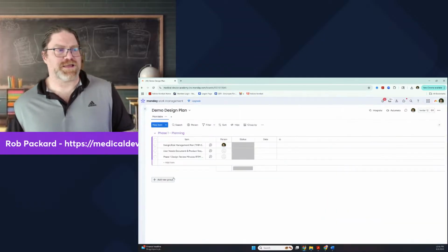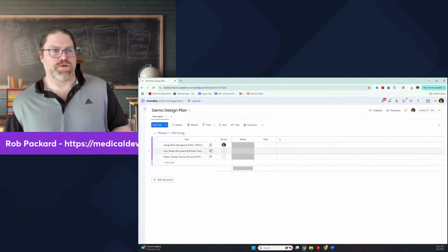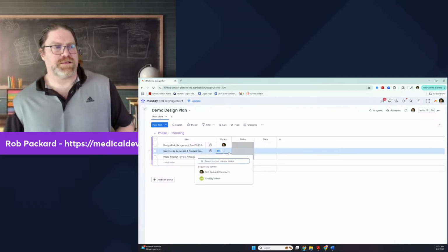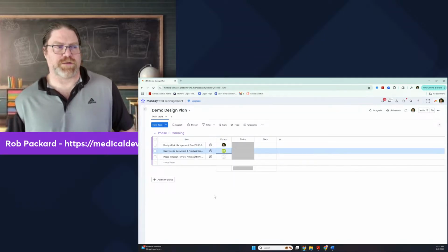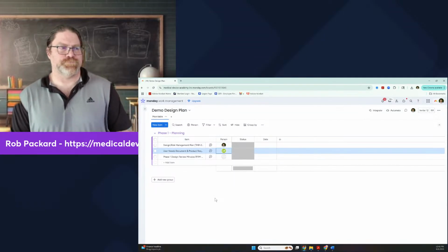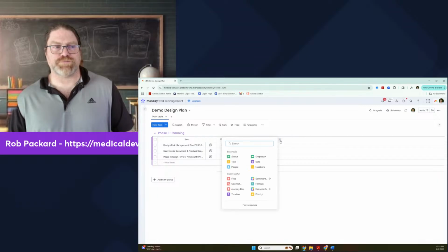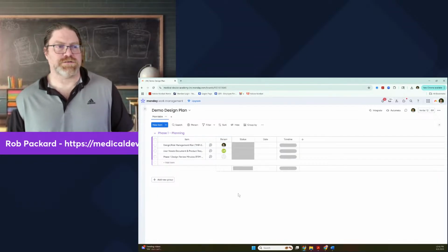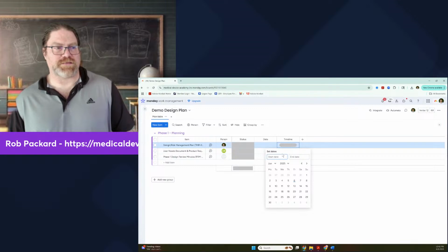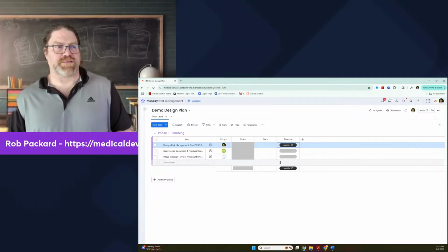So now I've shown you how you share. So now I can assign tasks to other people. So I could go in here and I could say, well, Lindsay's going to create the user needs because she's a marketing person. She's going to tell me what the customer needs. And you can have design review meeting minutes at the end of the meeting. You can also add columns here. So I could add in the timeline for the project. So now I can select dates, like when am I going to create this? Well, I'm going to start it today and I'm going to finish it on Tuesday. I can do stuff like that.